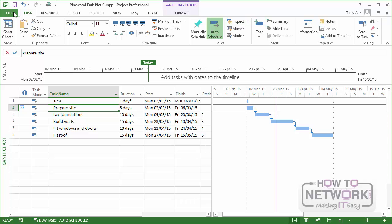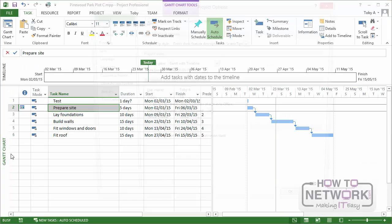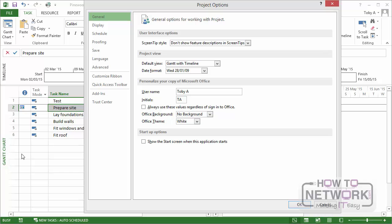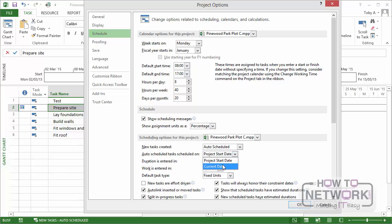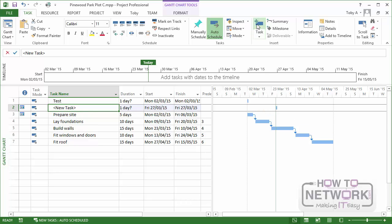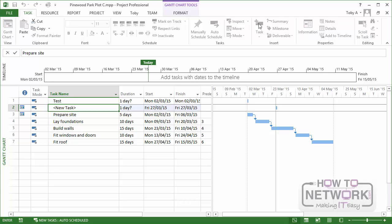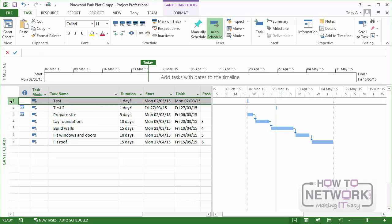So let's go back into the project options again. Go to the schedule tab and one of the options down there under scheduling options for this project is auto-scheduled tasks scheduled on project start date. I'm now going to change it to the current date. Click on OK and I'm going to add another task. I'm going to call this one Test 2. Now Test 2 has been created on the current date as you would expect.